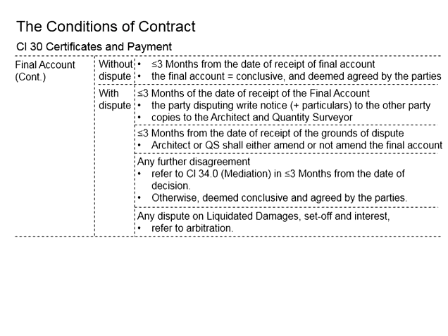This will have to be subjected to the justifications given by the disputing party for the entitlement. Once this final account, which is the final version after the initial versions, is confirmed, the latest version of the final account shall be given to the contractor and the employer. We will need to see their response if there is any further dispute.